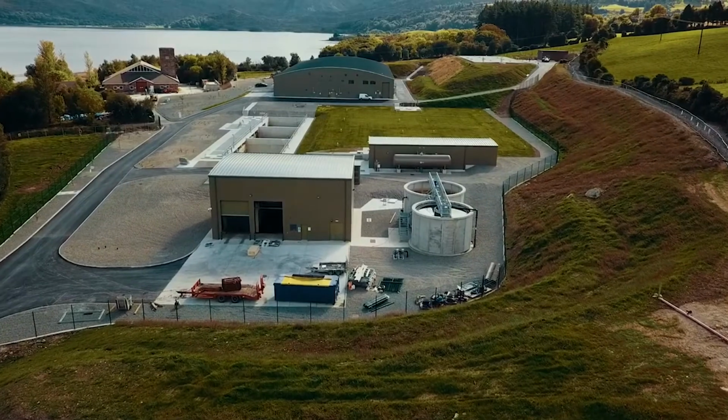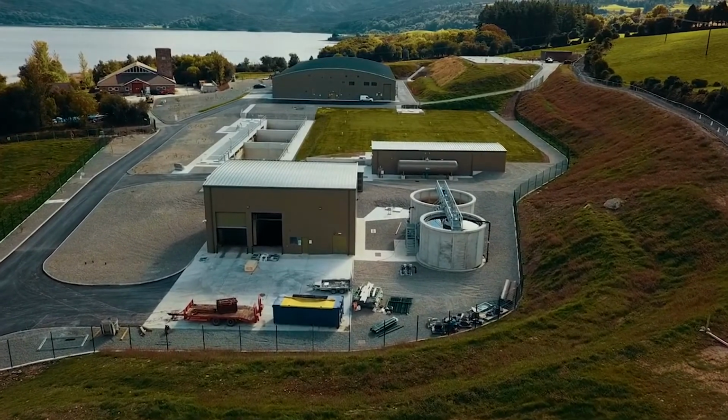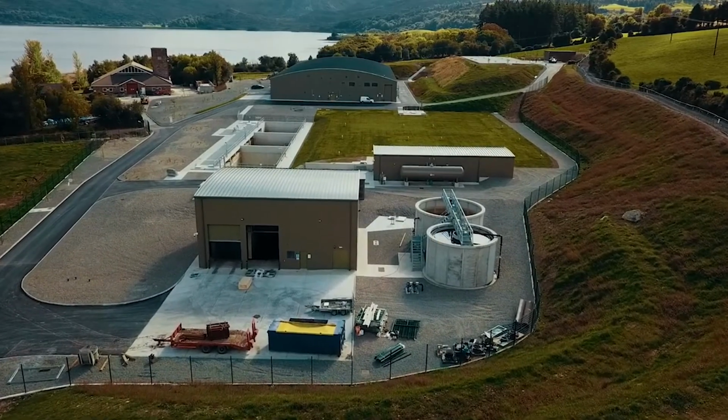Furthermore to that, the lake levels dropped again, and water actually stopped leaving the lake down the Finnow River, which caused an issue for the aquatic life in the river, and we worked closely with the inland fisheries to actually put an overpumping facility to maintain a compensation flow into the river.